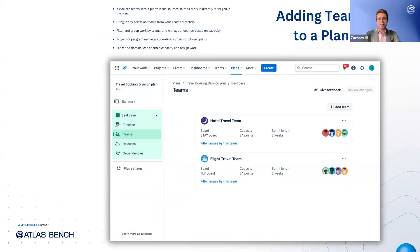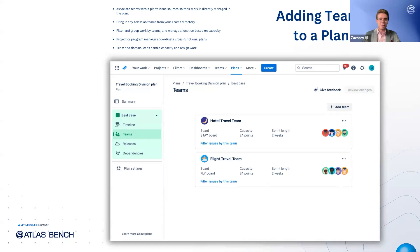To ensure your plan accurately reflects the day-to-day efforts of your organization, you'll need to bring teams into it. By associating teams with the plan's issue sources, their work becomes directly manageable within the planning environment. You can leverage any existing Atlassian teams from your team's directory, making it simple to include all the right groups. Once teams are included, you can easily filter and organize the work by team, as well as manage their workload based on capacity. Typically, project or program managers take the lead here, prioritizing goals and identifying critical paths, while team and domain leads focus on capacity planning and assigning tasks to the right people. This alignment helps ensure that everyone knows what they're accountable for and that the plan remains realistic and achievable.